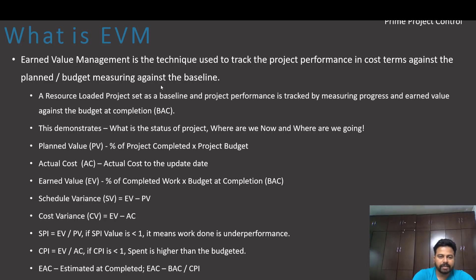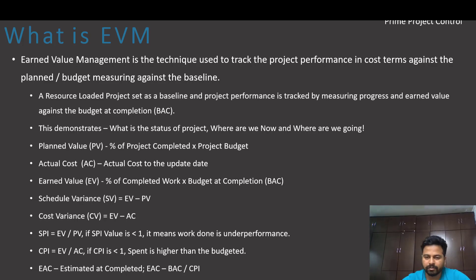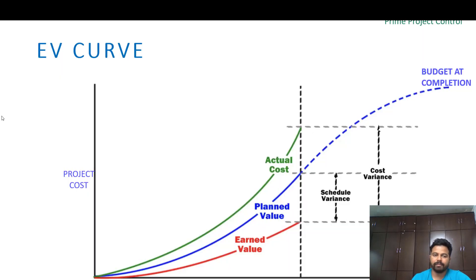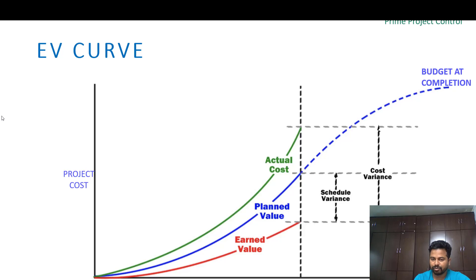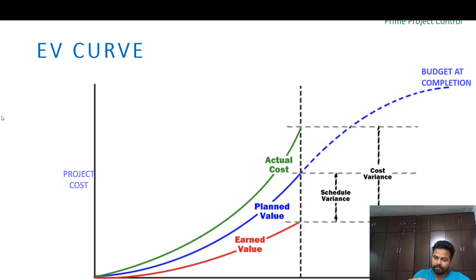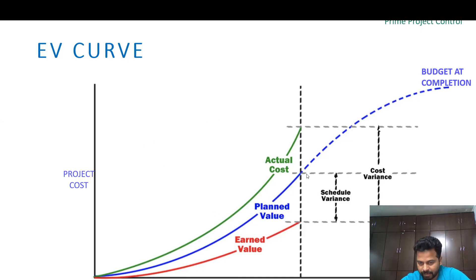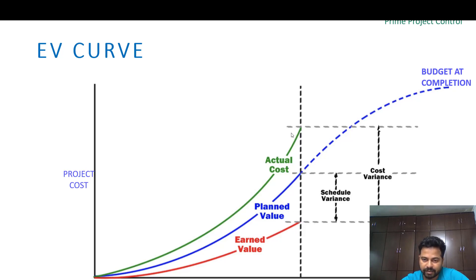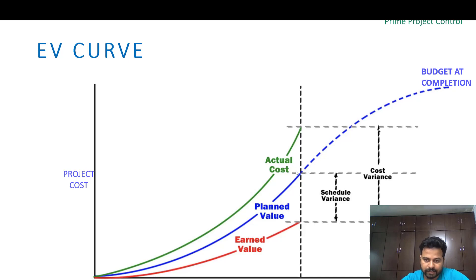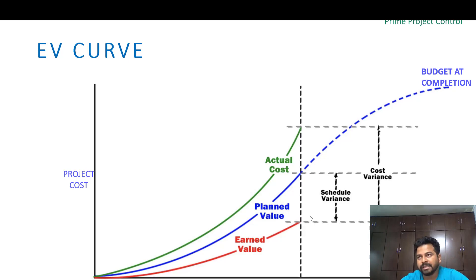We will demonstrate this in a graph. Let's go to the graph. This is the EV curve. If you notice, on the Y axis is the project cost and the X axis is the time duration. The red line is the earned value over a period of time. The black line is the data date. When we measure at the data date, earned value and planned value, we are seeing a difference. The blue and red - we are seeing the EV is less than the planned value, and actual cost (green) is higher than the planned value.